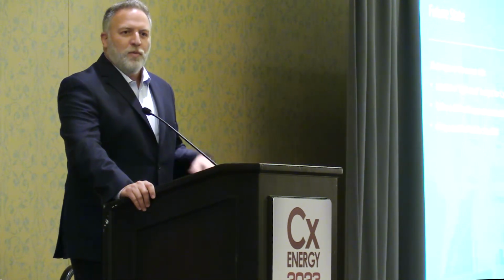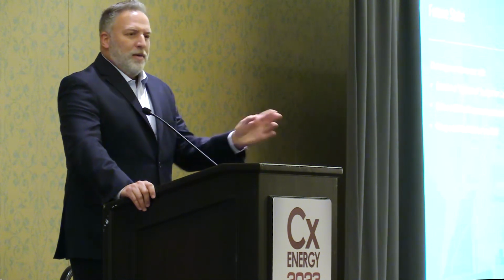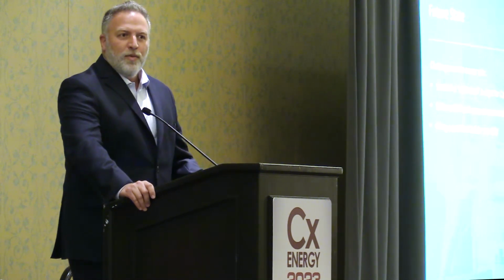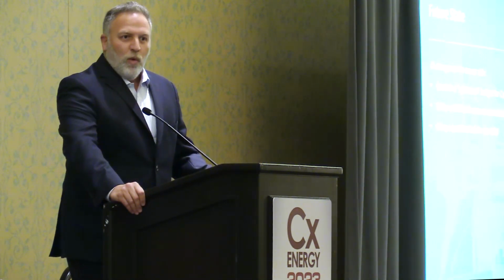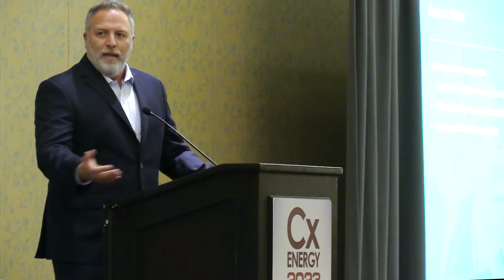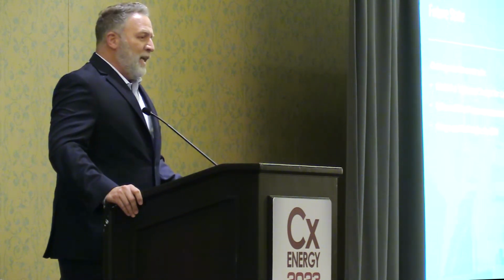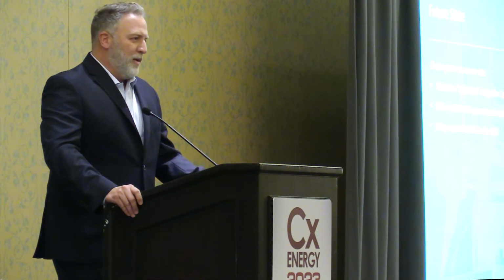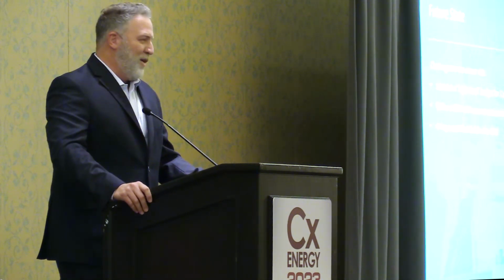And then hiring a qualified CXA, right? We're all in this workshop together because we all want to believe in the same standard and the same guideline, right? We all want to be level set so that when Emily goes out to do her work, she knows Oshkon's going to be doing it the same way, right? I, as an owner, want to trust that every CXA in this room is going to do it that same way to that same standard. That's why we get a CXA certification. Once I can pre-qualify all of our CXAs into our program, now I can start to make it a quals-based selection, which is what we all want, right? We all want to be level set and not just be focused on low fee. And that's where we have to influence finance and purchasing to trust the owner when it comes to hiring the right CXA. Any questions?